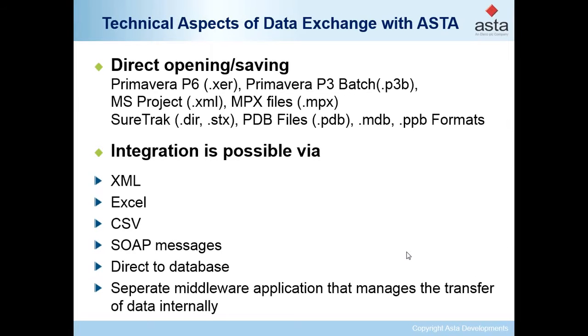That is for the SAP system, and when we look at the Asta Powerproject side, we need to know the technical aspects, understand the concept, and see how Asta is integrated. Actually, Asta is a framework which allows you to customize for your requirements. In the technical way, if you are already a Primavera P3 user or Microsoft Project user, even if you have files from SureTrack, you can bring them into Asta and open them directly, or from Asta you can save your projects directly in these formats such as P3, P6, and Microsoft Project.